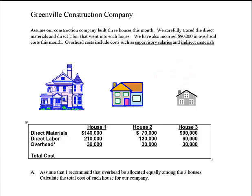I have allocated overhead equally to each house. Now you total up the materials, labor, and overhead to get the total cost for each house. House number one — adding materials, labor, and overhead — comes to $380,000. House number two is $230,000. House number three is $180,000.